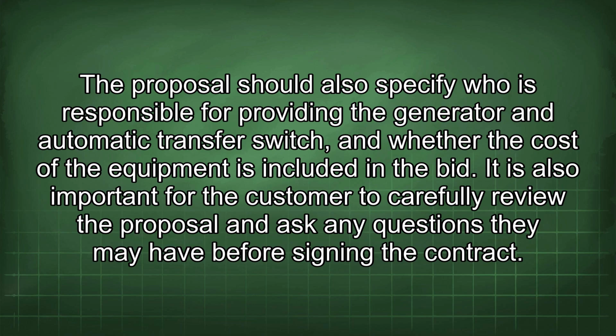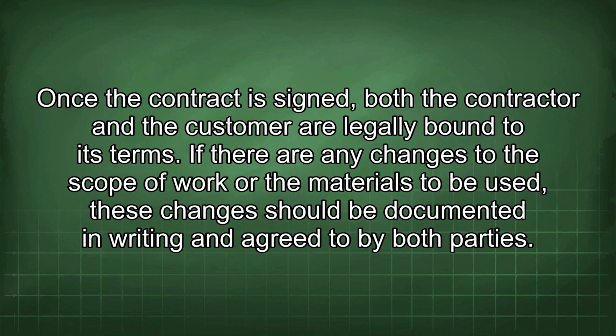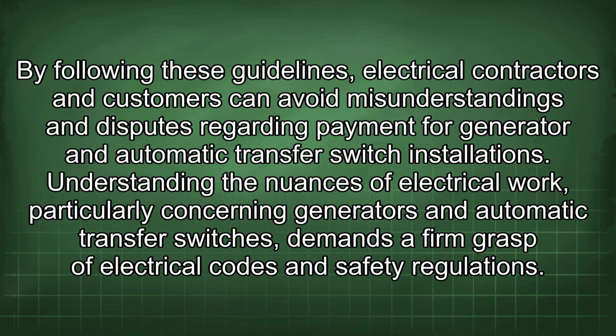It is also important for the customer to carefully review the proposal and ask any questions they may have before signing the contract. Once the contract is signed, both the contractor and the customer are legally bound to its terms. If there are any changes to the scope of work or the materials to be used, these changes should be documented in writing and agreed to by both parties.